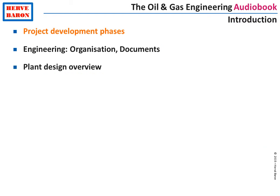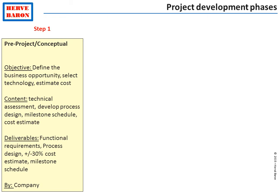What happens when an oil and gas company decides to develop a project? First of all, the company planning, business planning, or pre-project department reviews and performs a technical and economic assessment of this new development: what business benefits will it bring, what is the technical feasibility, what is the cost, what is the rate of return, and so forth.